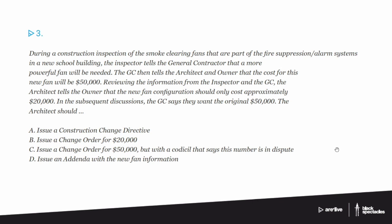It's happened to me, it's happened to a bunch of friends of mine, where as we go through, we have a whole plan, and then the fire marshals come in and put a smoke bomb into a thing and see how does the smoke actually get out in time. That's a typical thing for assembly spaces and things like that. And if it works, great. If it doesn't, then they'll say, nope, you got to replace it.